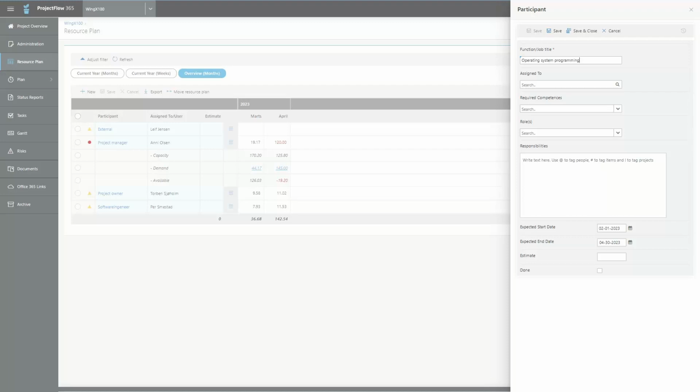If you already know who should be assigned the role, you can fill it in right here. However, in this example, the participant to be assigned the role is based on their skills. Therefore, fill in the required skill, Cloud Specialist, here. For the role, select Project Participant.